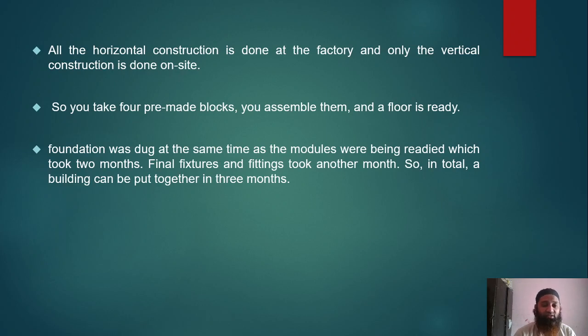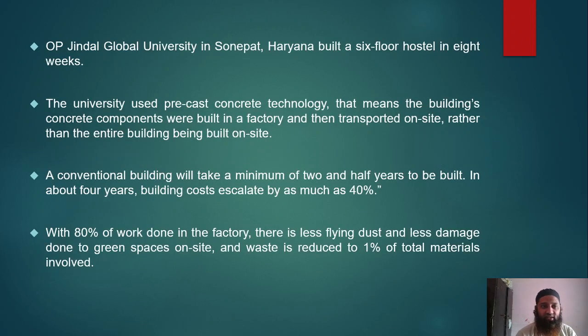You just imagine the amount of time being saved here, the standards also maintained, and the strength also achieved. Everything is achieved with time. You can just see here, OP Jindal Global University in Sonipat, Haryana built a 6-floor hostel in 8 weeks. A 6-floor hostel just in 8 weeks. You can just imagine what amount of time is being reduced because of this type of construction.